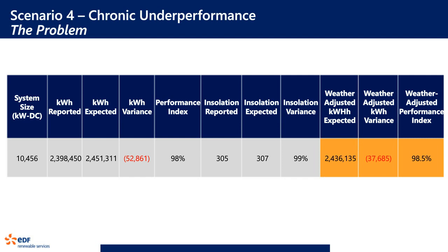Yeah, so you're right. I mean, that's the answer, right? You can't accept perpetual underperformance and just say, it's a mystery, right? There's too much money left on the table. So in this case, what we did was go back and push the numbers through the model again, right? How big of a problem is this? And really what I was looking for in this case was, how much money do I have to find this problem, right? At some point you can't just keep chasing your tail and spending money fruitlessly, right? You start with the low-hanging fruit, and frankly, there just was none here.